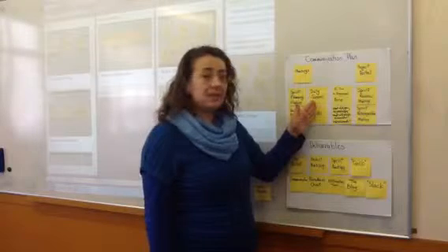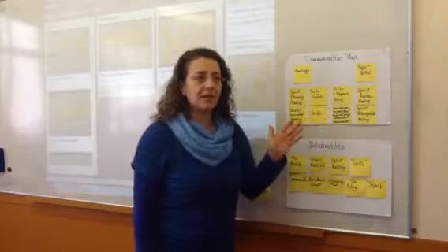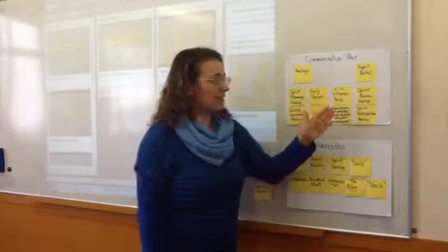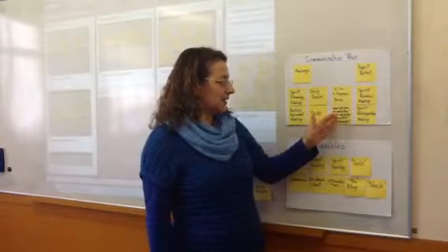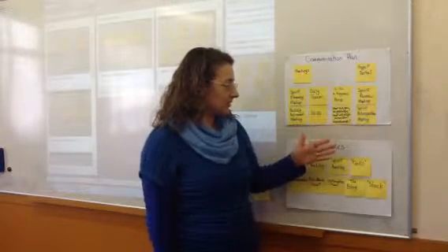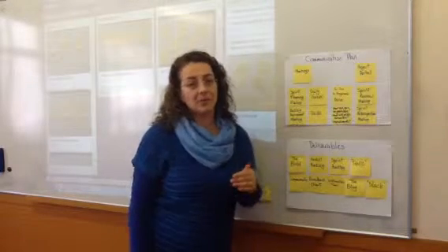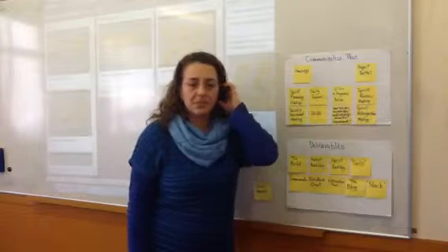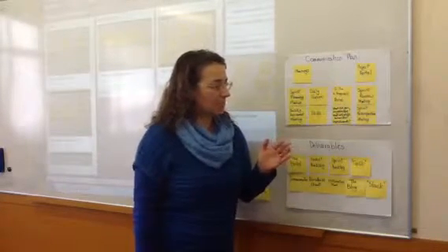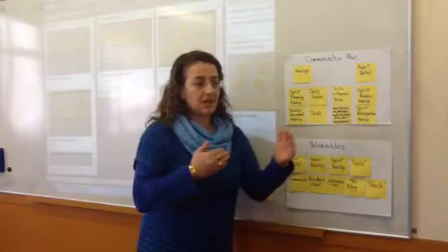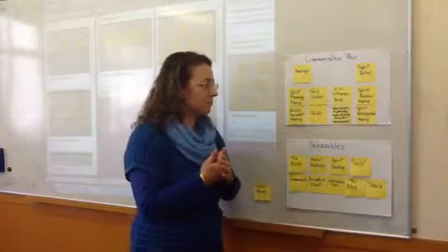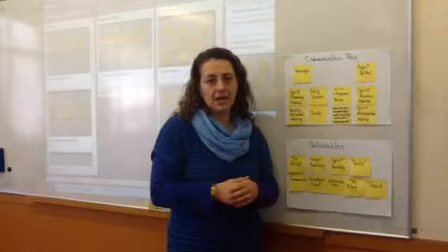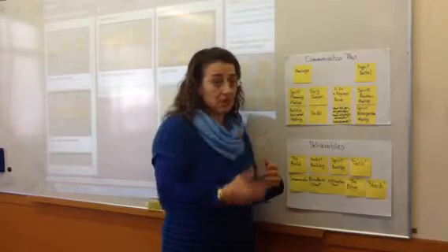We will have daily meetings, they're called daily scrum. They last 15 minutes long, and during that time each member will answer the question, what did you do yesterday, what will you do tomorrow, and what are some of the impediments. So it may be seen as a reporting process, but it's in fact keeping everybody informed, and if there are any barriers to achieving the task, how can we as a team help to get through that.